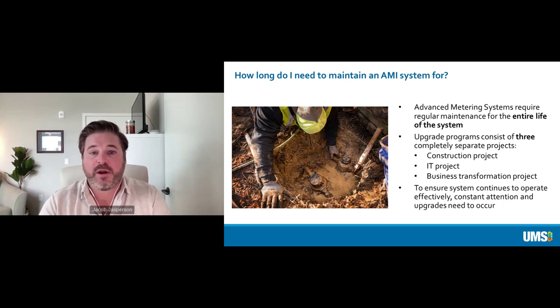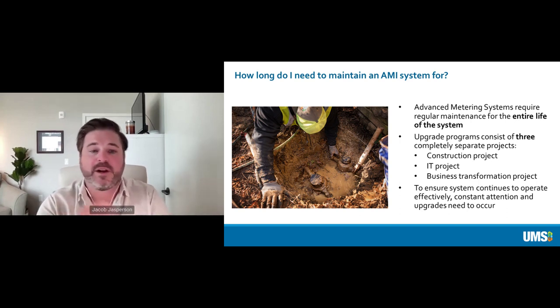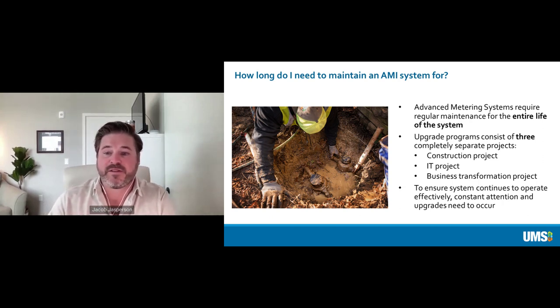And so, what we see a lot of utilities do is they'll say, well, I'm going to maybe phase this in over a 5-year period, right? Or I'm going to maybe start with my metering system and then I'm going to upgrade my billing system. Or, hey, I'm going to do the CIS first and then we'll get to the AMI project. And the reality is that in order to really benefit from all of the components of these changeout programs, they need to be done holistically because of all of these different interdependencies.